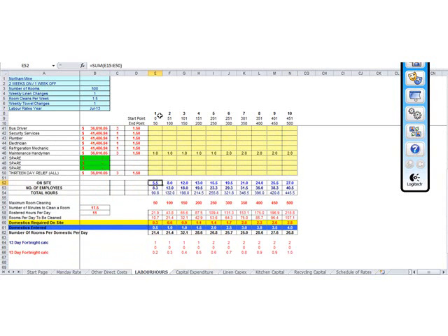What that has ended up telling us down the bottom is the amount of people on site. Here, if there was 0 to 50 people accommodated, they need 5.5 people on site. If we go up here to column L, which is 351 to 400 people, they've decided they need 24 people on site. At K, which is 301 to 350 people, they will need 21 people on site. So those are the key figures to have a look at there.